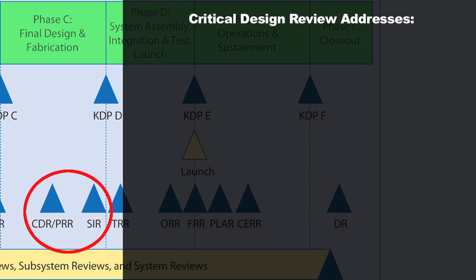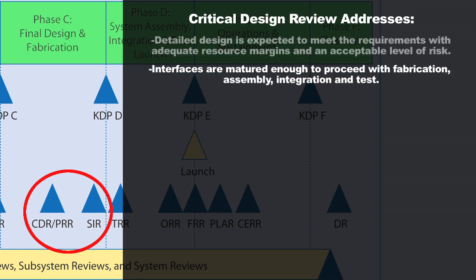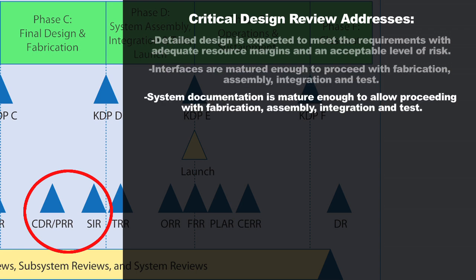At the Critical Design Review, you're going to be looking at all the detailed design work that you've done, and an external technical review team will assess whether your design is going to be able to meet the requirements laid out for it, with adequate resource margins and an acceptable level of risk. They'll look at things like the defined mass for the satellite — checking that the current design looks like it can be completed without going over the mass limit. They'll also look at interfaces and make sure they've been matured enough to proceed with fabrication, assembly, integration, and test of the system.